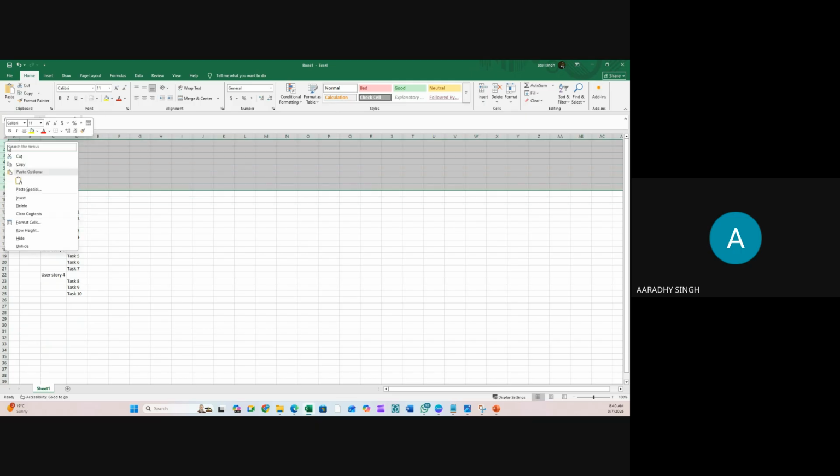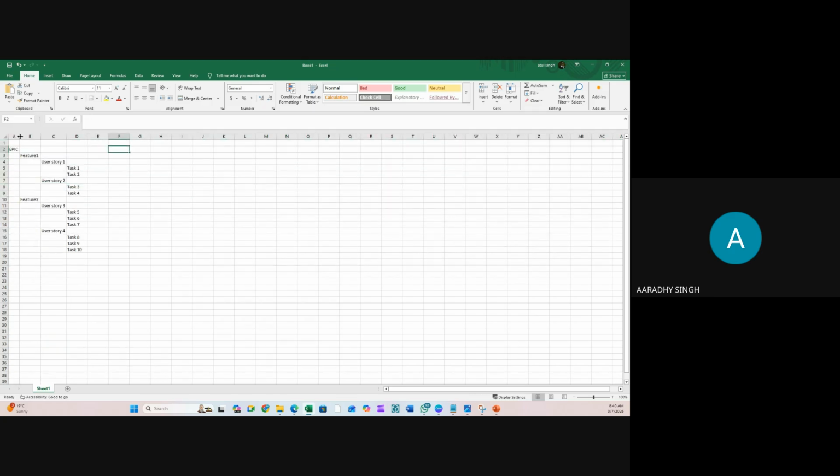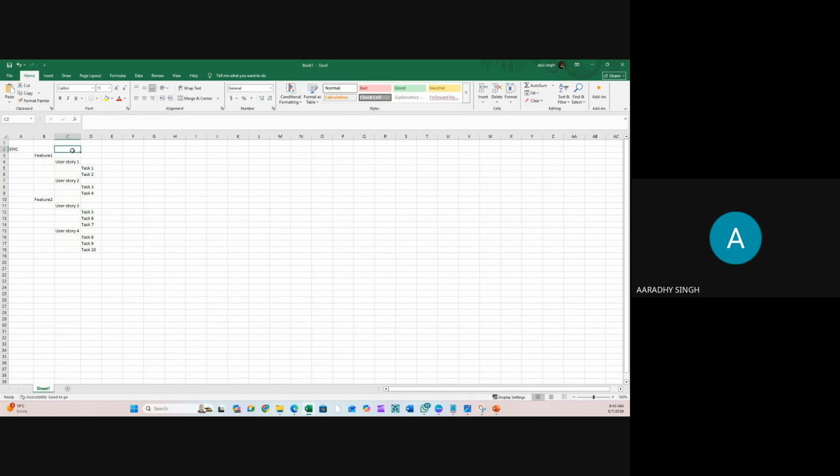Now, the question is, if you're planning to deliver a project, what should be the duration? So, guys, duration is not fixed. In one project, if it's a short duration project, like 3 months or 6 months, then you can go with a single epic. If the duration of the project is a few years, like 1 year, 3 years, or 5 years, then in that case you can go with multiple epics.